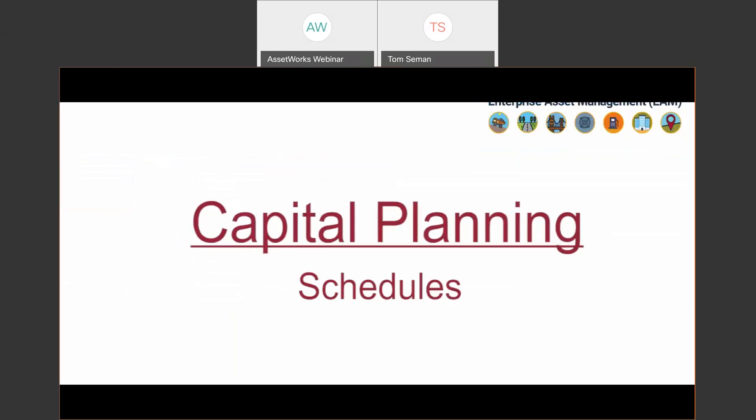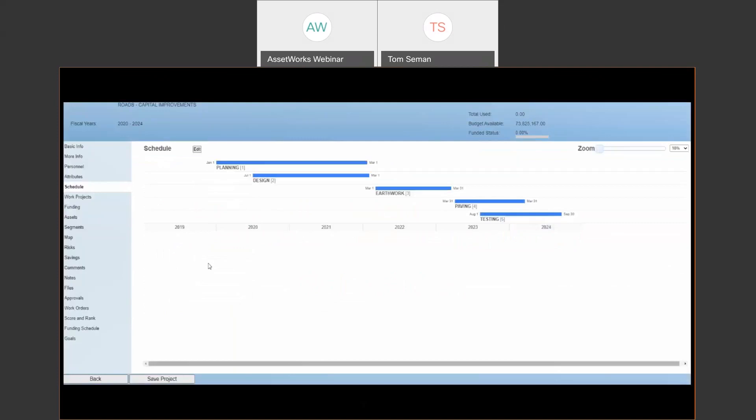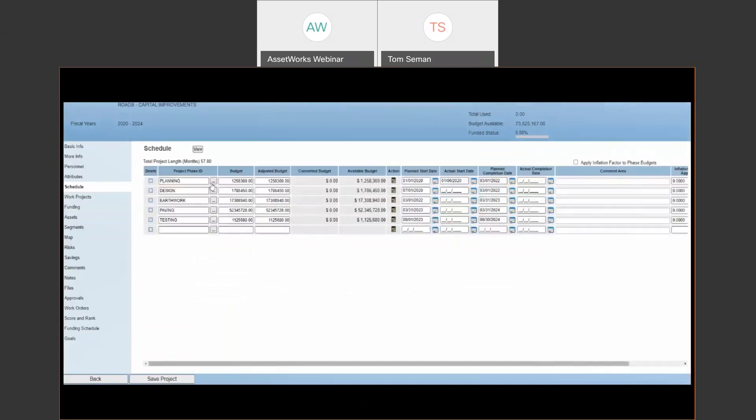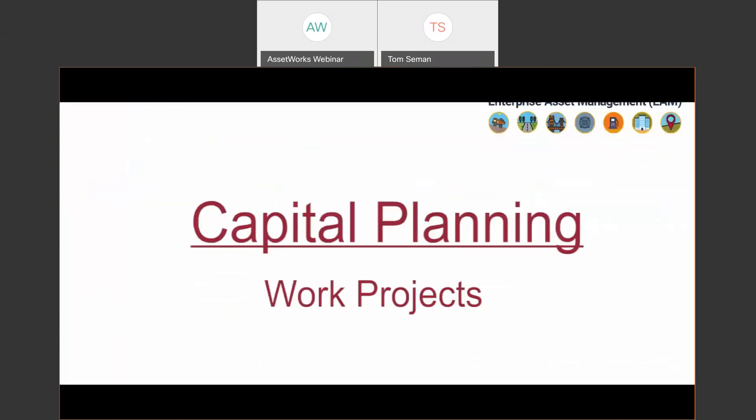One of the main sections is our schedule section within capital projects. So these projects that fall under the plan are going to have schedules. And you can see here the timeline that was shown in the calendar is driven from creating a project schedule here. You can edit these schedules by adding phases, budgets, and plan versus actual start and completion dates.